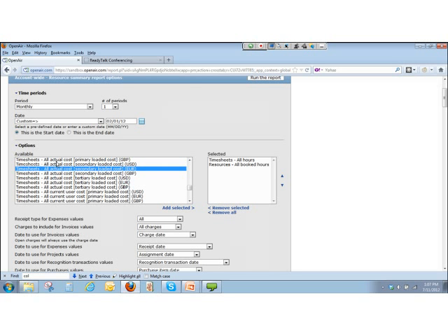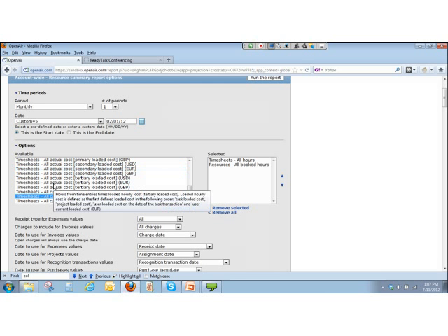And really what that allows you to do then is you can actually create intercompany revenue reports, where you take the cost that you charge to the other country minus the cost of the user to your own company, and the difference is the transfer rate, or basically the intercompany revenue that you would have earned based on transfer policies. Okay, so there's some options there in using just the combination of these two standard fields and a custom calculation to create quote-unquote revenue values.